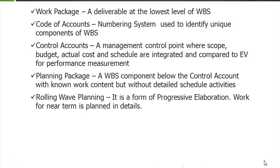Rolling wave planning is a form of progressive elaboration. In this case, planning takes place for immediate activities in much more detail than future ones. As we go further into the project and start understanding more about what needs to be done, we start planning the details of the activities gradually.